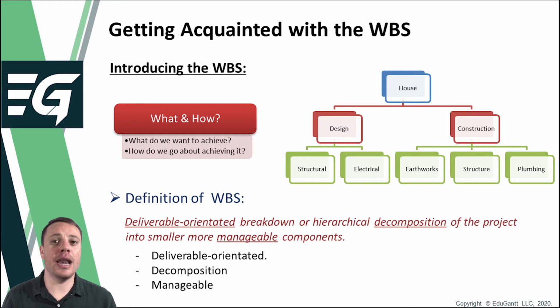The next piece in the puzzle involves translating the project objectives and the deliverables identified in the project scope statement into specific, well-defined work activities. In other words, the specific jobs and tasks that must be done by the project team in order to achieve the project objective and create the specified deliverables must be identified and documented. This is of particular interest in large, very complex projects where it may become easy to miss or even duplicate certain work activities. This is done in answer of the how component of the project scope baseline, and it is where the procedure known as the work breakdown structure comes into play.